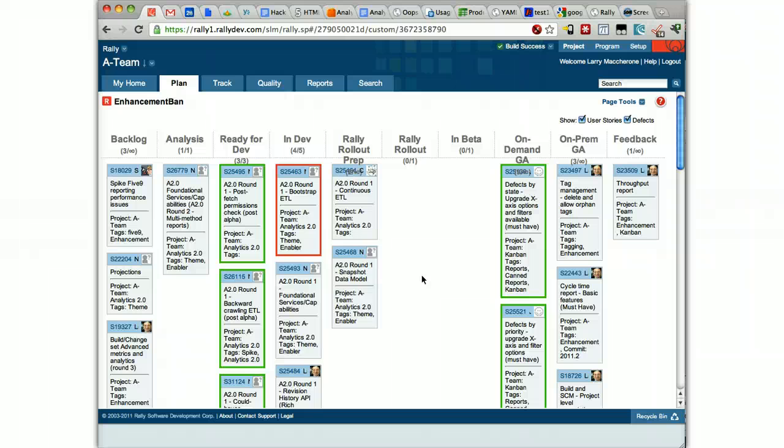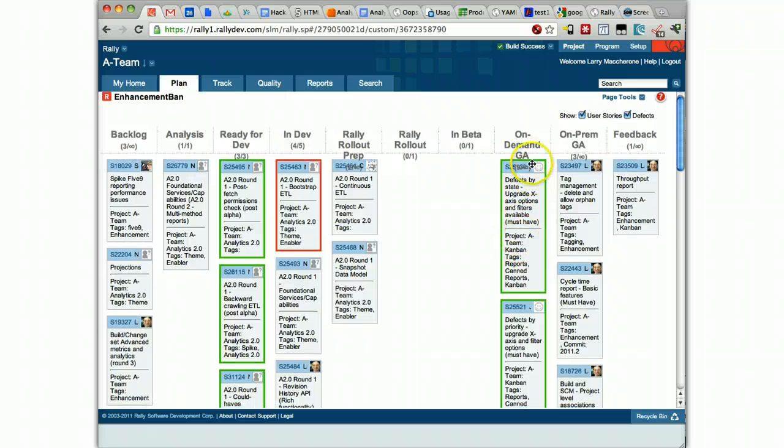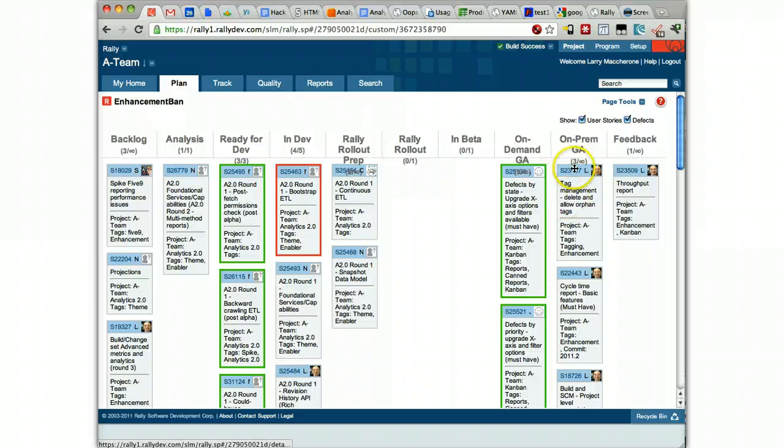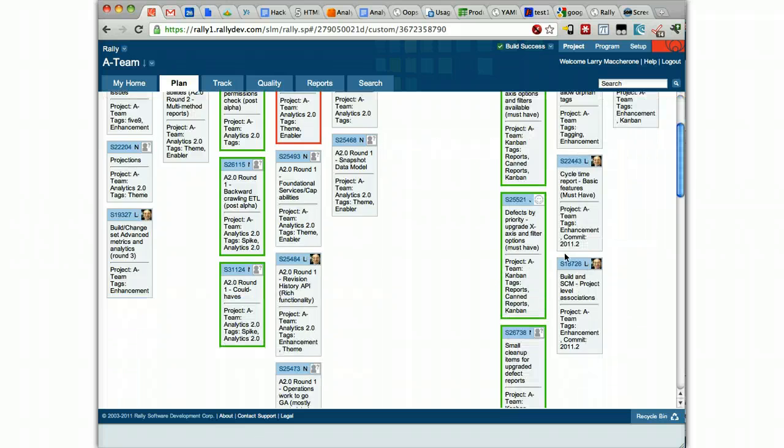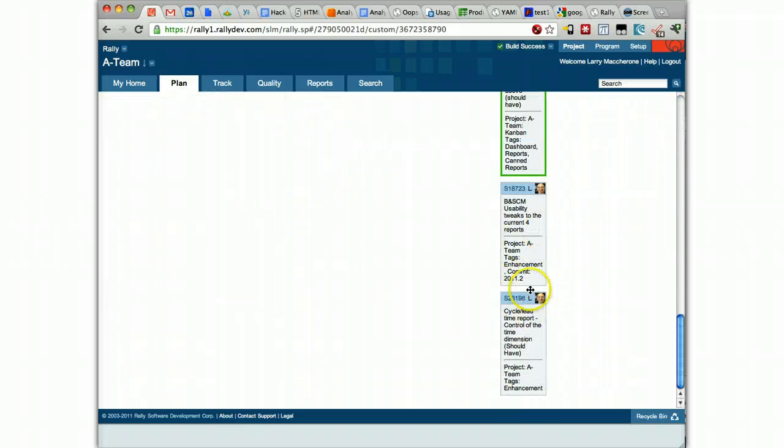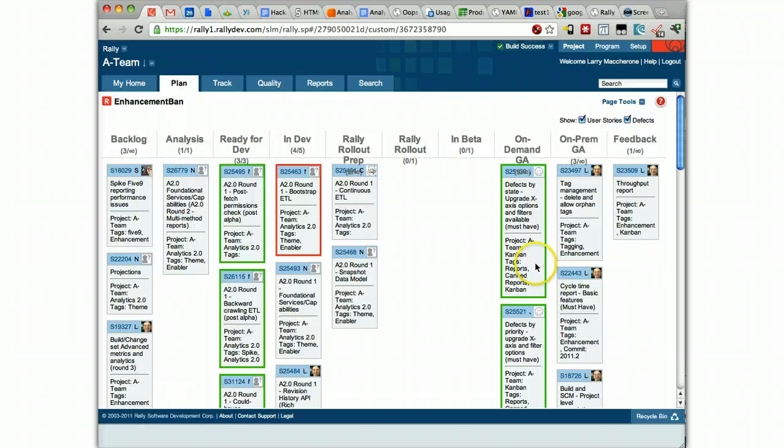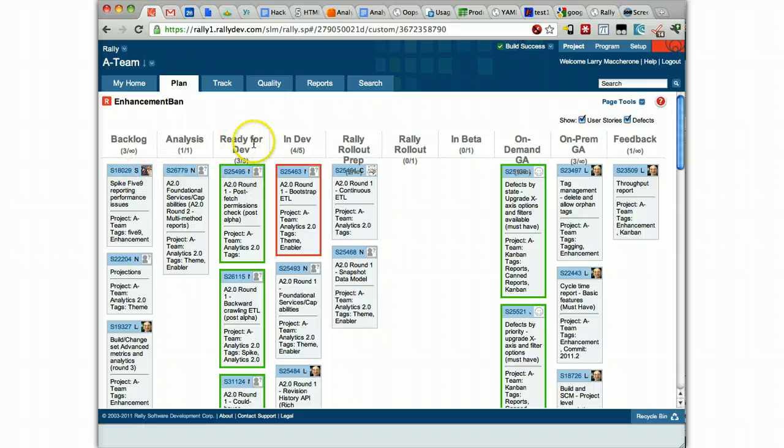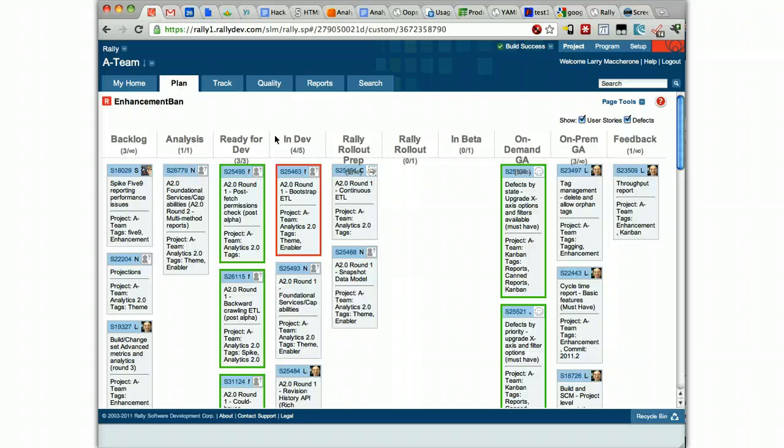This is where the POs end up doing a lot of their work. They will follow up on things. This stuff is in our on-demand product, our SaaS product, but it hasn't yet been shipped to our on-prem customers yet, because we have to mail them a disk. We only do that quarterly. So this is an inventory for our on-prem customers. We can track how long stuff ends up staying in that inventory. There's some stuff that happens after the enhancement rolls out, feedback as well. There's some stuff that happens before that, analysis that's ongoing before I give it to the team. And then these two columns here overlap with the team level board that I saw. So anything that's in these two columns is also going to show up on that lower level board that the team had.